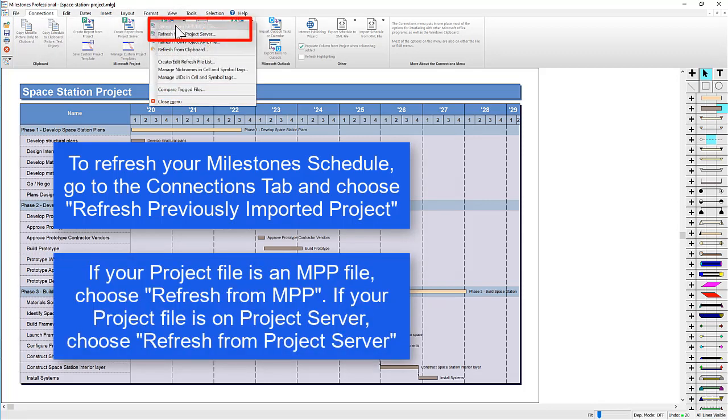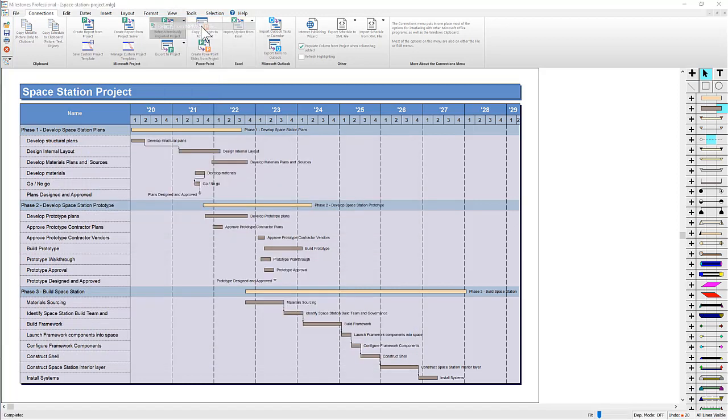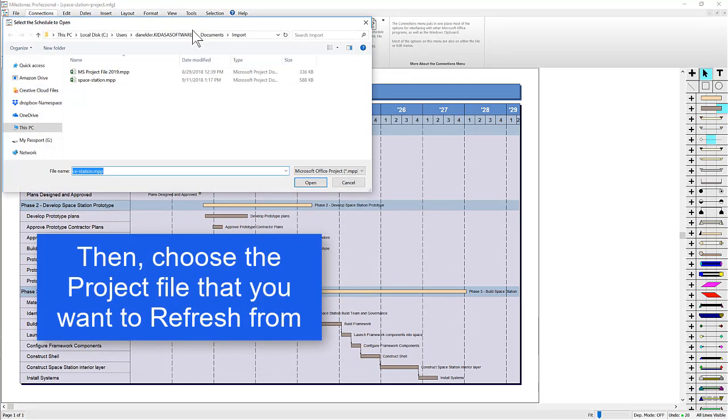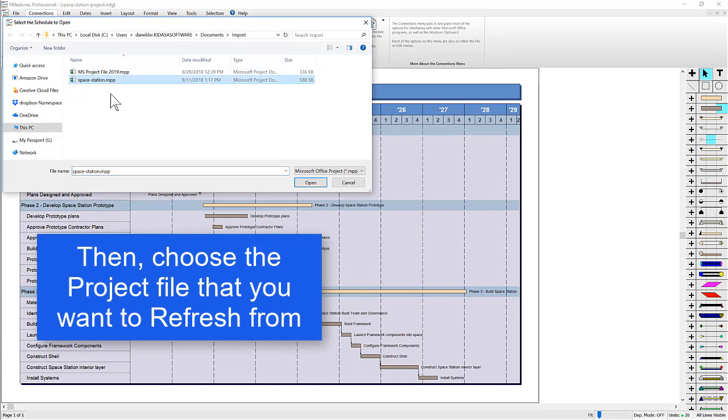If you're refreshing from an MPP file, you'll choose Refresh from MPP File. If your information is on Project Server, you'll need to choose Refresh from Project Server. I'm going to choose Refresh from MPP File, and then I'm going to choose the MPP file that has my new dates, and then I'm going to choose Open.